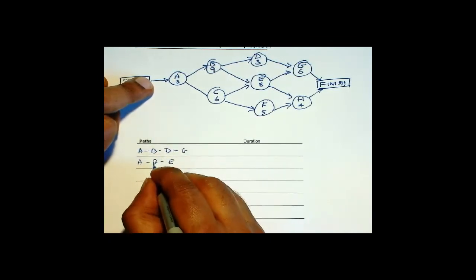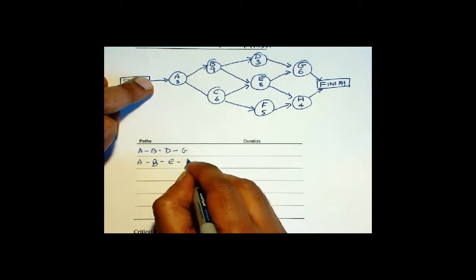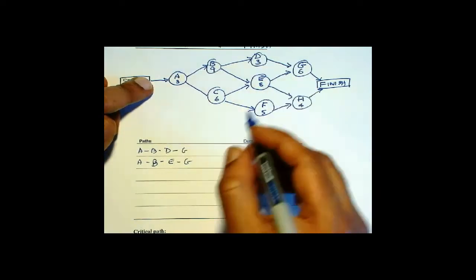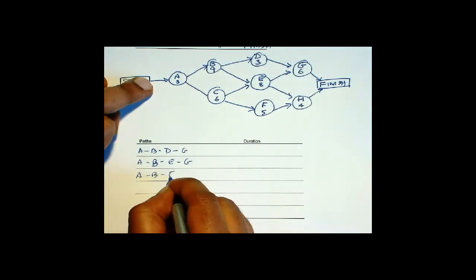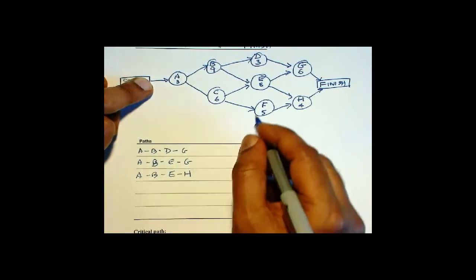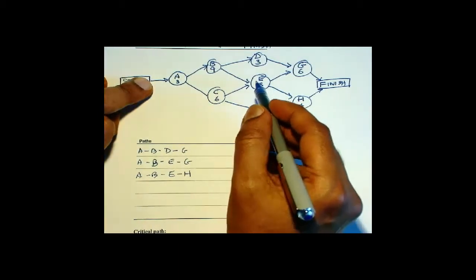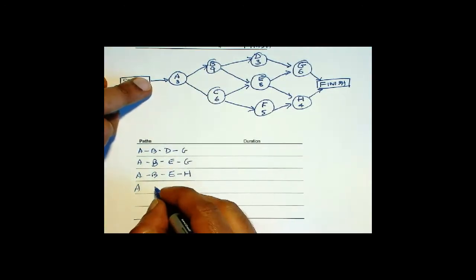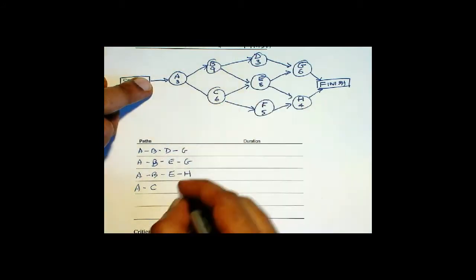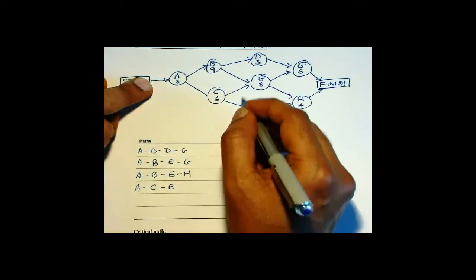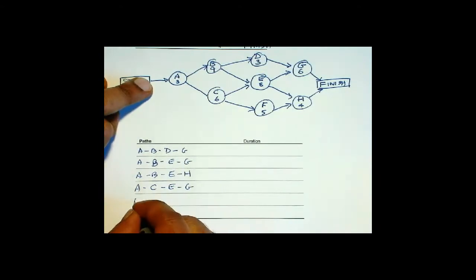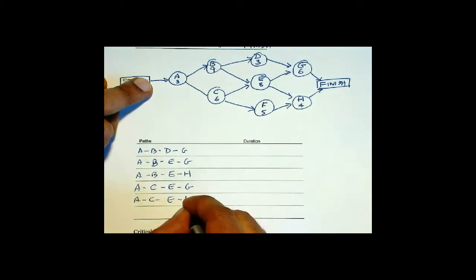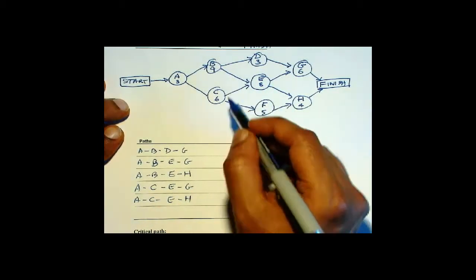Now we made a choice at E, so you have to trace back only up to E and then make the other choice. That will be H. Now go back to A, and now you make the other choice. So C, and once again you have to make the upper choice, E and G, and then trace back to E and go here, H, and then trace back, you get A, C, F, H. So these are the paths.